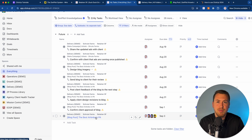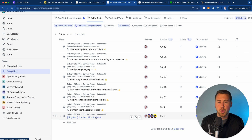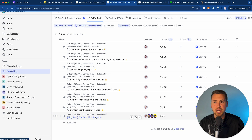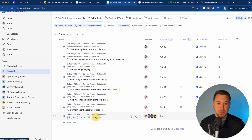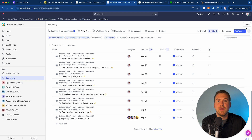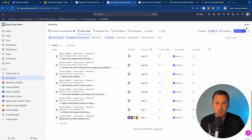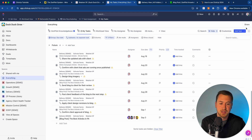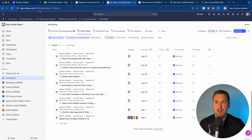You may make the excuse that your team has been working in this for a while, so everyone really knows what their role is. But this is not going to be scalable because as you bring new people on board, they're not going to know what they're supposed to do within this workflow. And sure, you might be able to communicate a bunch in this parent task to figure out who is doing what. But with that, you're also not going to know what specific day your step is due, which is going to make it hard to really plan these projects and get them delivered on time — because no one's going to know when the writing is due, when the first draft is due, when we need to proof it, or when we need to get it to the client.